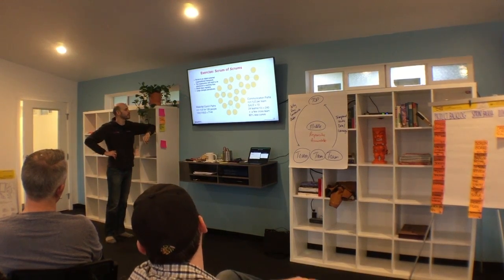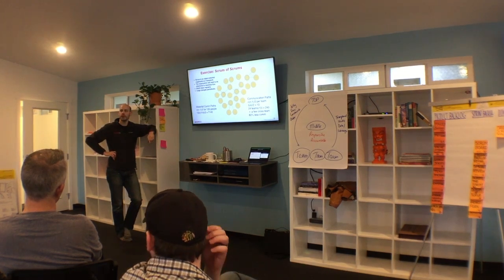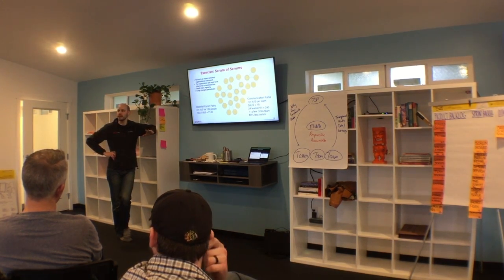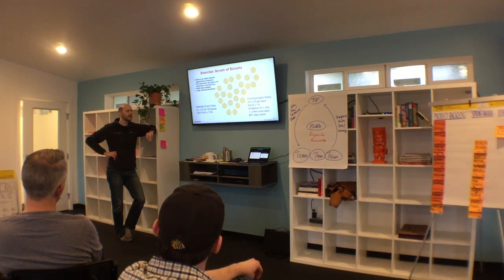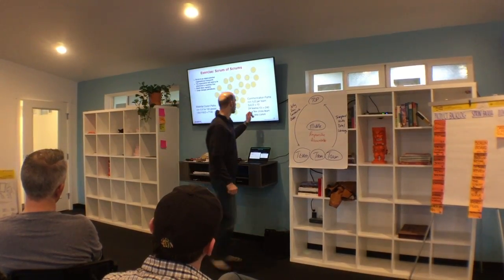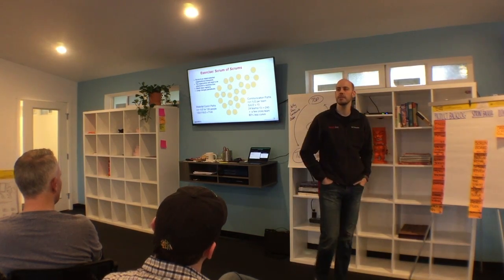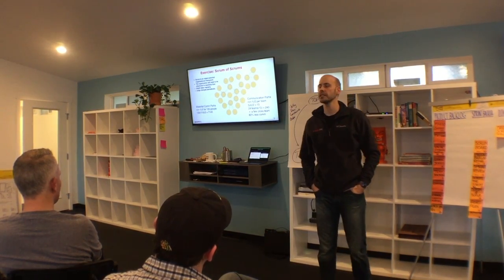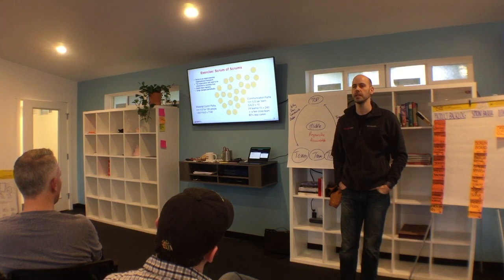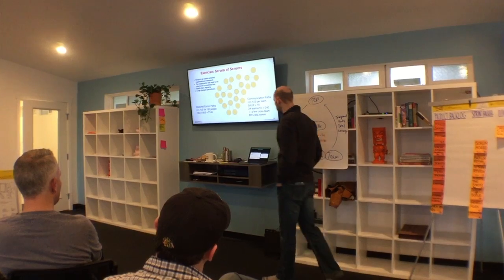For everyone in a company of 120 people to discuss a topic just once, hopefully that drives up communication saturation, there are 7,140 communication pathways required in an organization of only 120 people. On the right, using Scrum of Scrums, there are 80% fewer communication pathways for everyone to have access to the same level of communication. This is how cells communicate. It is the most efficient method of communication we know.